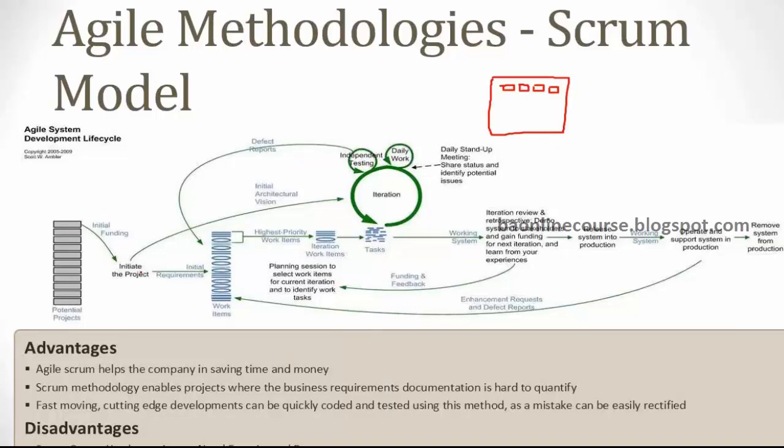So first the project is selected, right? So once the project is selected, you would have listed down all your features or functionality which is there as part of your product. Let's say there are some 20 features which need to be developed as part of your system, right? So those 20 would be listed down. Okay. Now which one is important for you, right? Now the reason we do it is the first iteration or the first few iterations would focus on the most important features, right? Why? Because you get the maximum utility out of it, right?